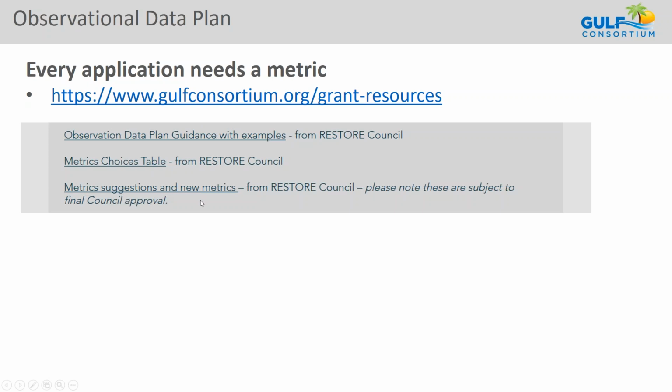They've reviewed all the SEP project descriptions and made recommendations about project metrics. They're looking at these in terms of a complete project, so they're not looking at separate project milestones having separate metrics. If we are doing a project application for some planning work or engineering and design work, we do need a metric associated with that. Your metric will be something like the number of engineering and design plans delivered.